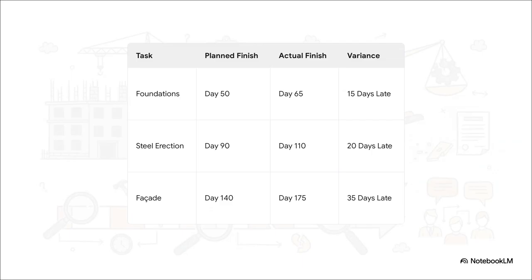First up, we've got the most straightforward observational technique out there: as planned versus as built. It's simple. You just take the original plan and lay it on top of what actually happened. You can instantly see the differences, right?